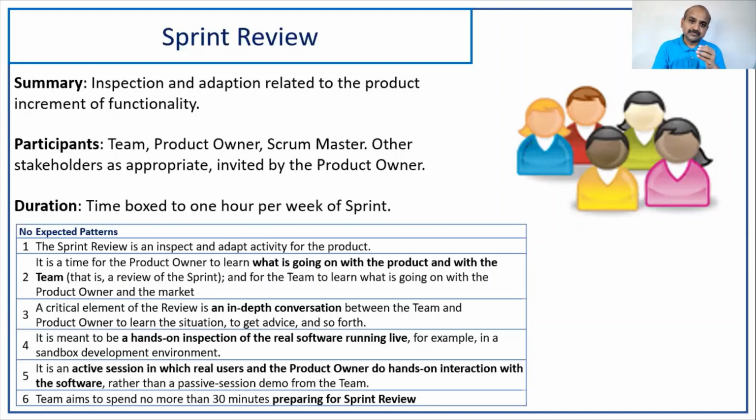We call them the sprint review preparation meeting, or a mock meeting, wherein you mock it. Somebody in the team will act as a product owner, and the people who want to present, they present it. There'll be certain questions. So they do a certain rehearsal. That's called a rehearsal event, a 30 minutes rehearsal event before the main event, and it is important.